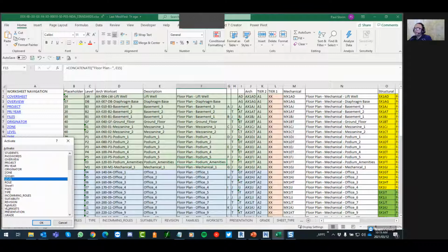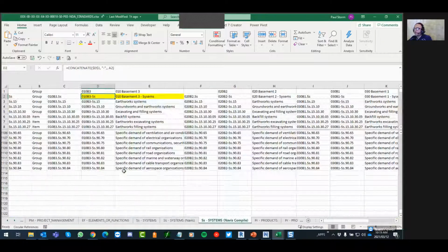So by way of explanation, that is all that I'm doing here, saying that the workbook structure would be applicable to successive levels from the basement up in the sequence at which elements are constructed. This will help divide the project up.